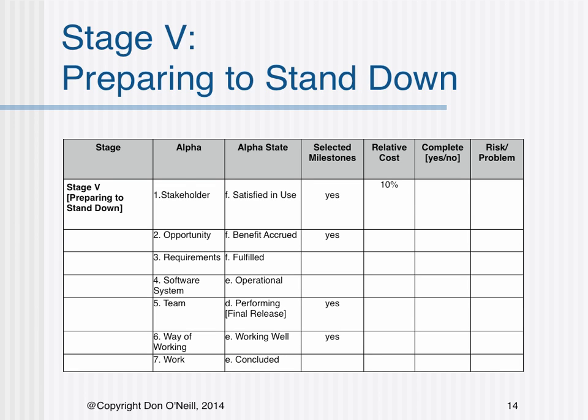Stage 5 entails obtaining stakeholder satisfaction in use. The opportunity benefit is accrued. Requirements are fulfilled. The team has performed the final release. The way of working is working well. And the work is concluded. The critical selected milestones revolve around stakeholder satisfaction in use, the team having performed the final release, and work concluded.